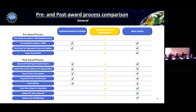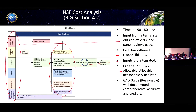Schedule and cost monitoring — earned value management is not required for mid-scale projects. NSF has established a scaled approach with a reduced administrative burden. That information can be found in the Research Infrastructure Guide. I'll turn it over to Sean, who will talk about cost analysis.